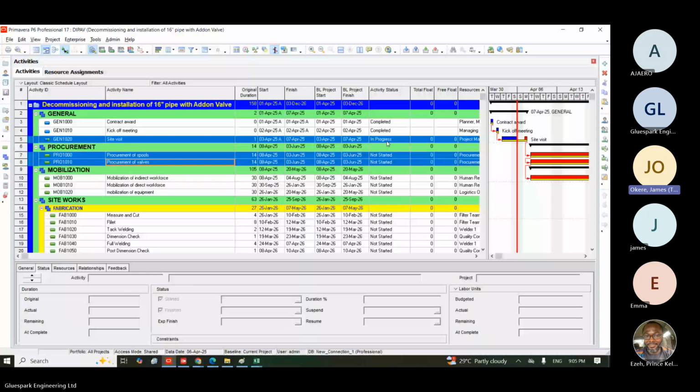It's good, but sometimes they won't give you the actual value. And the reason is that a project is dynamic. I can plan to do a job for 3 days. Perhaps I plan to use 2 persons, but quite unfortunately, I now have 4 persons. I start that job of 3 days, I finish it in 1 day, right? So in that case, I will need to update that this activity that was planned for 3 days was also finished within that same day, which the 2 methods we have done earlier cannot do for you, because they are always checking the current date and the date you are updating,